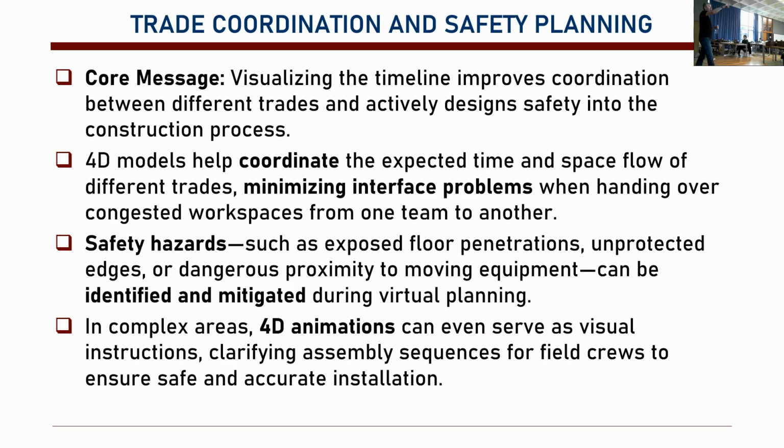So we can say that for this window, I have a space of like 2 meters from the window, 2 meters out, where I'm not going to be able to let anyone in when I'm putting it in. If you define these workspaces, my professor in the US, her PhD thesis was about that, back in 1998 maybe, I don't know. The windows were defined with their workspaces, so construction activities were organized based on these workspaces. So you know that this person needs the space for that window, and you need to be able to provide this.